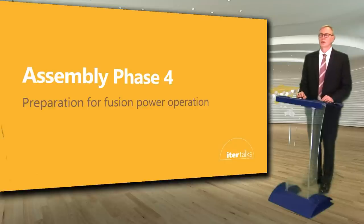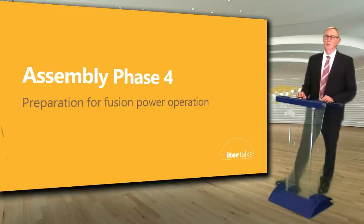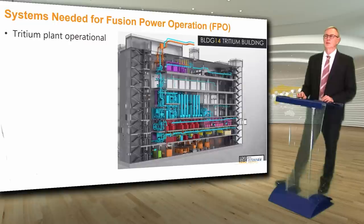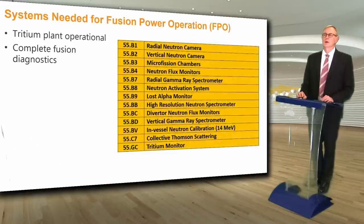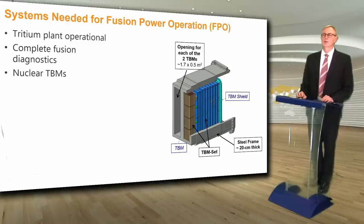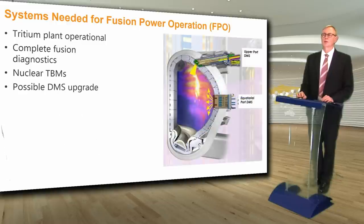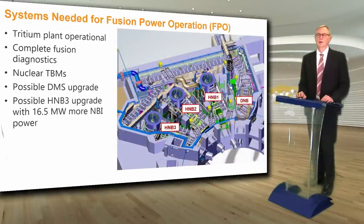Then we will have assembly phase 4 to make the final preparations for fusion power operation. The systems needed include having the tritium plant operational, the complete fusion diagnostics installed and ready, and the nuclear test blanket modules installed. We may also upgrade the disruption mitigation system and the neutral beam heating system with an additional 16.5 megawatts of heating power if needed.